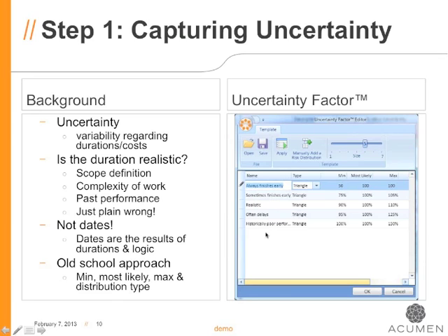We've got 5 different categorizations, and the categorizations on this particular project are based on historical performance. So when we're ranking groups of activities, if certain activities historically have always finished early, whether it's activities on this project or maybe similar activities on a previous project, those activities then get flagged and they inherit this ranking on the right-hand side.